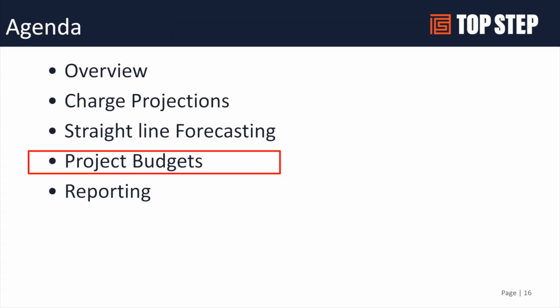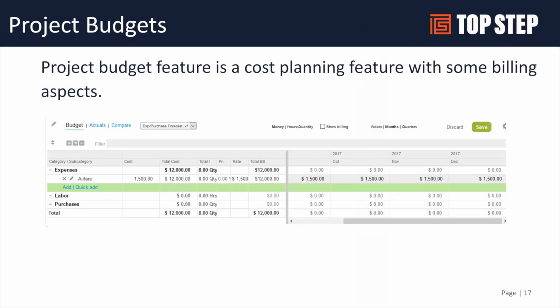I mentioned project budgets. There's 3 different ways you can track budgets in OpenAir. There's just the standard budget field that you can populate on a project's properties. There's what are called transactional budgets. This is where under the financials, you can set multiple budgets if you want to track costs, change orders, or as budgets change, or even having budgets by the different elements of the project.